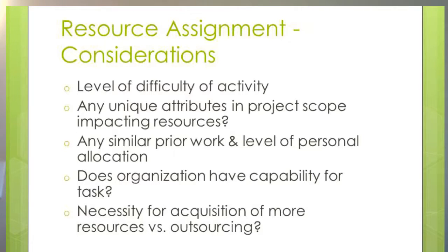would affect the resources. Also, availability of similar prior work by the organization and the level of personnel allocated to the task is going to be helpful to determine the current needs, and also whether or not the organization has the required capability in terms of people, equipment, and materials for performing the work. And lastly but not least, whether or not there is a need to acquire more resources versus outsourcing for the task.